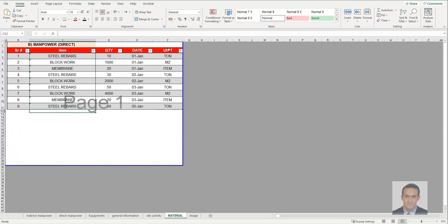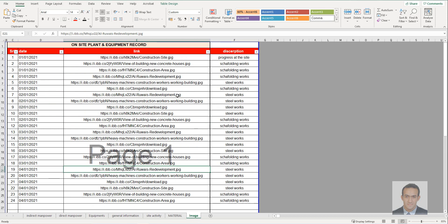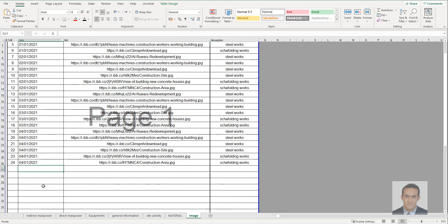For materials, it's very simple. Once the storekeeper receives the material, let them update it here — the item, the quantity, the date, and the unit. For images, you have to put the direct link from whatever server or site you use, and beside it add the description.